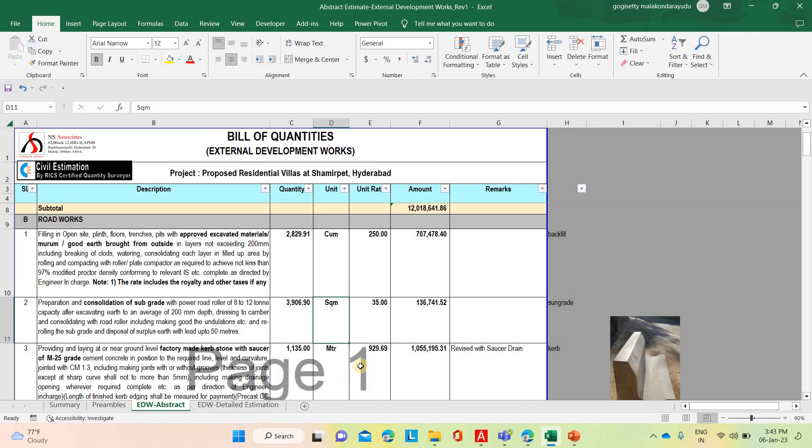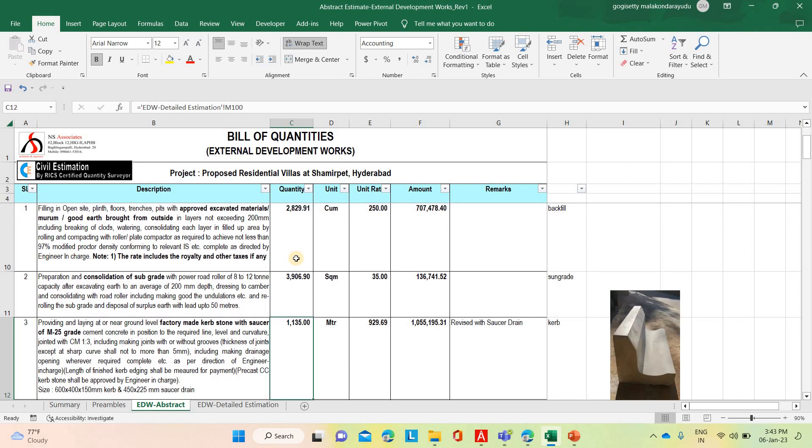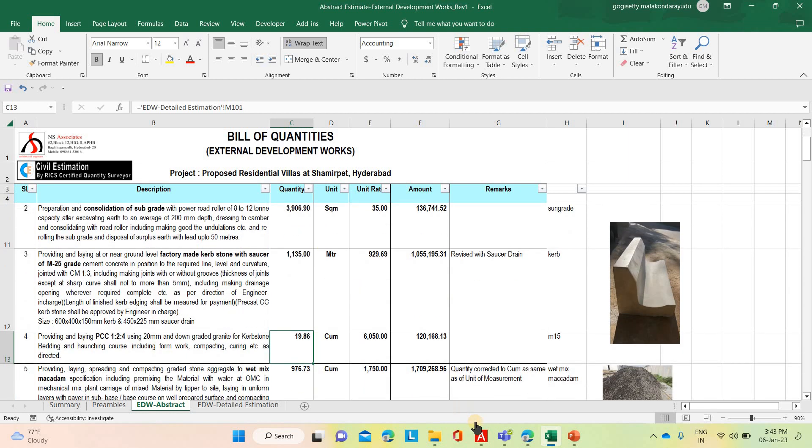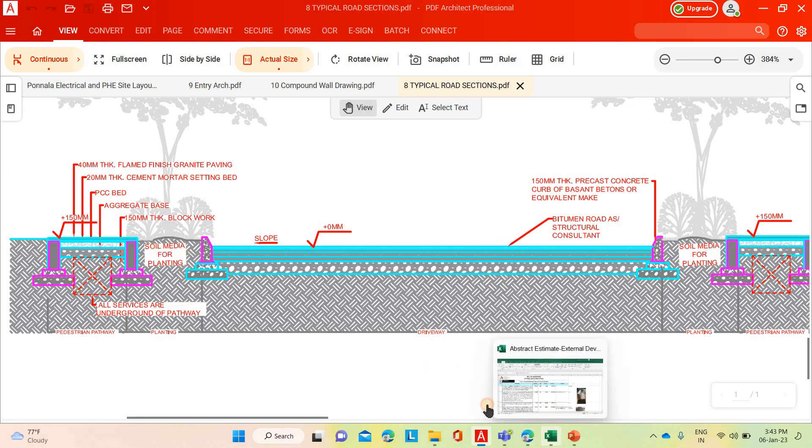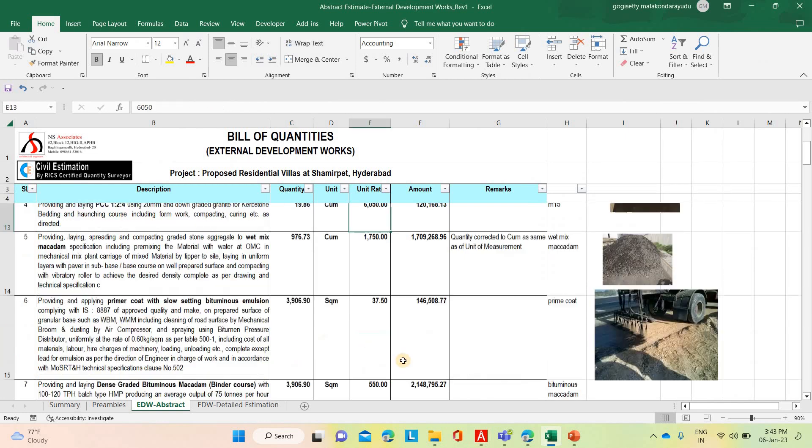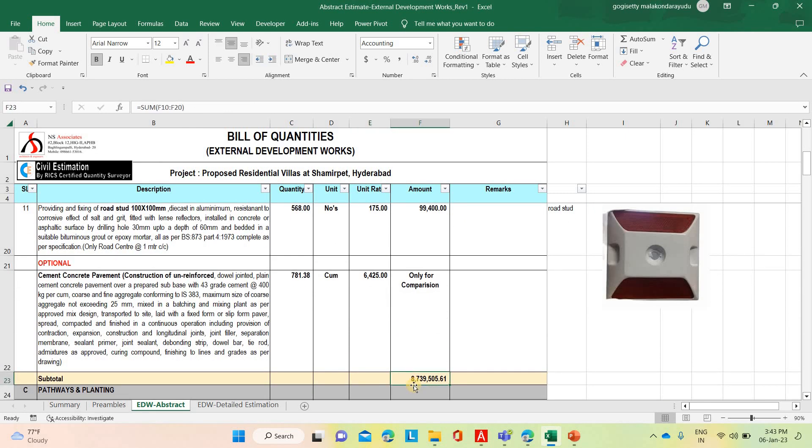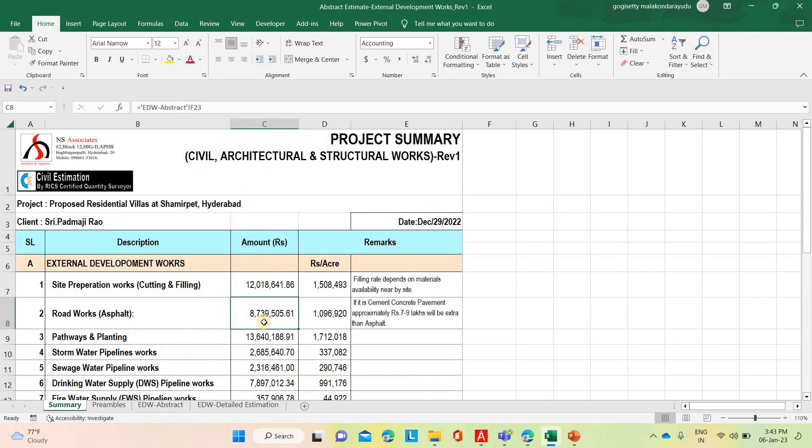Now the filling works and then consolidated subgrade, then curbstone. This is curbstone along both side roadside. Under the curbstone, blinding concrete for the benching purpose. Then different road layers. After that, based on all the roads, total roadworks are coming 87 lakh 39,505. Per acre it is coming 10 lakh 96,920.